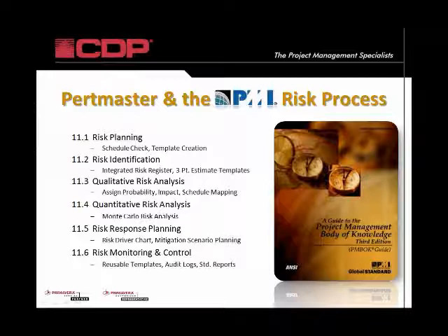A huge benefit of this Primavera risk tool, or the Oracle risk analysis tool, is you have the ability to take risk events, items that you didn't plan for in the scope, that you may have just in an Excel spreadsheet, and you don't even know if they're going to happen or not. Something like a contract delay or a permitting issue, things you didn't plan for, but if they happen, they're going to have an impact on your schedule.